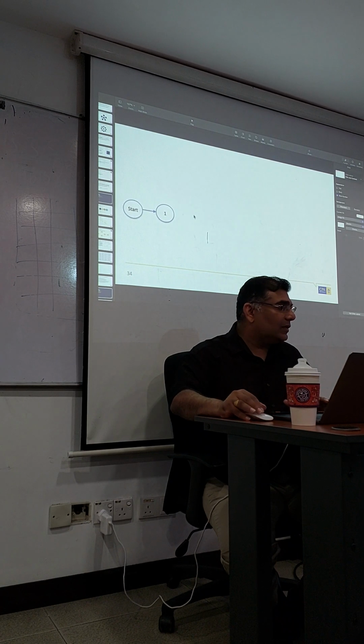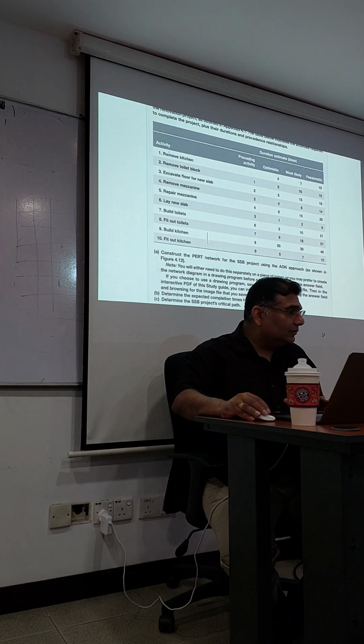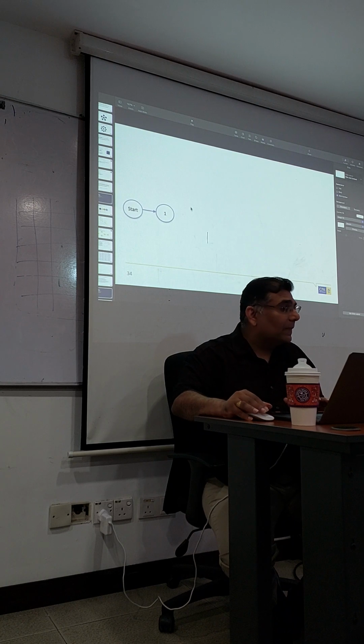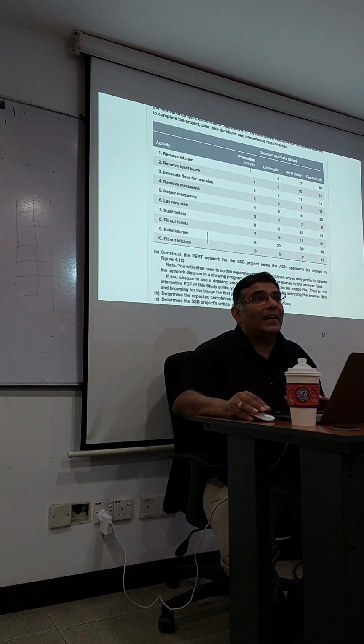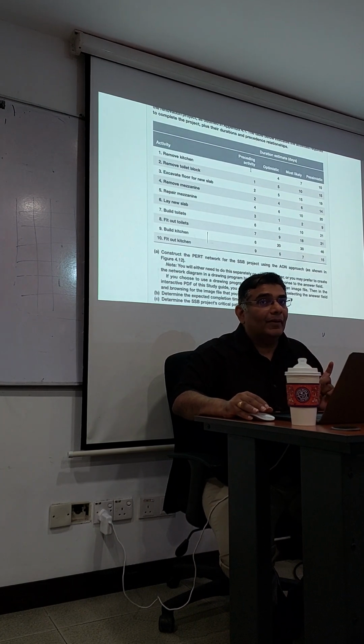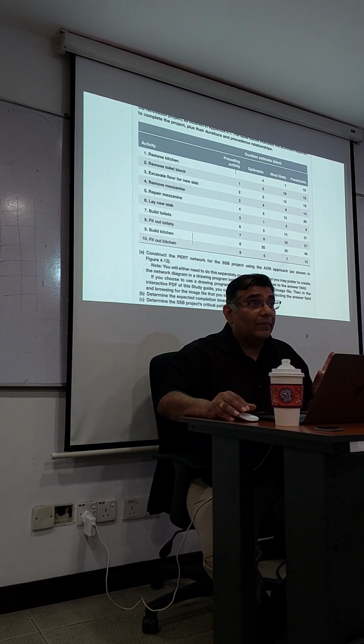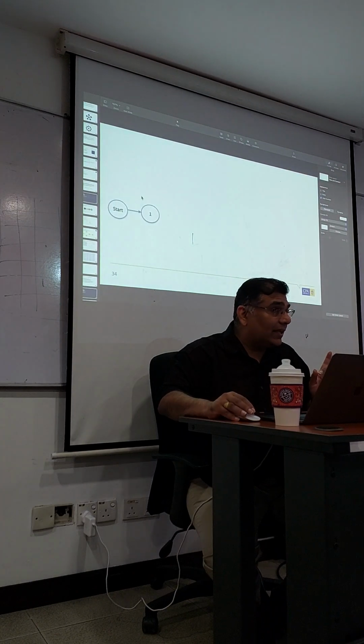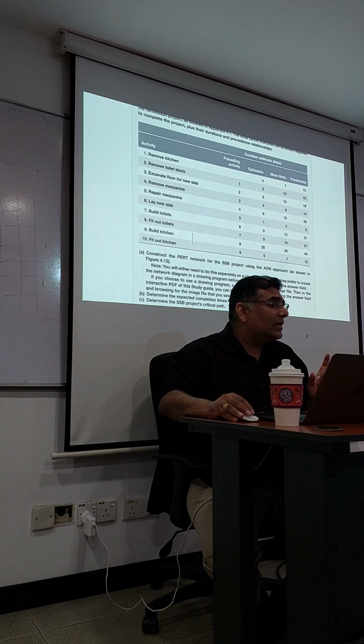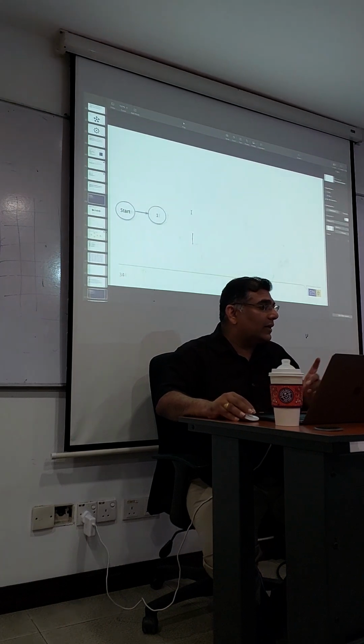Activity one, nothing there before it, so you could start there. If there is nothing, it's always start. If there is nothing, you connect to start. After that, let's see this one. Preceding activity 2, so this one is going to be 2.